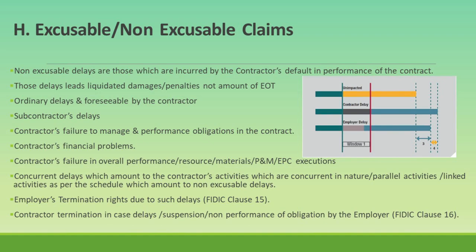Non-excusable delays grant the employer specific rights, including termination rights under FIDIC Clause 15. The employer can terminate the contract due to non-excusable delays caused by the contractor, including failure to proceed with due diligence, insolvency, or substantial breaches of contract. FIDIC Clause 16 provides the contractor with rights to terminate the contract if the employer fails to fulfill their obligations, such as providing access to the site or making timely payments. Managing these delays effectively and understanding the contractual implications is critical for maintaining project progress and avoiding costly disputes.